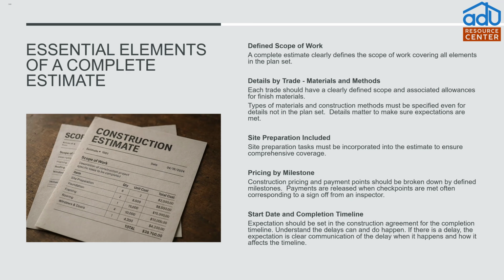When it comes time for, say, your electrician, the electrician should have it clearly defined maybe how many outlets are going to be there. They're going to talk about, if there's going to be extra outlets installed, what are their potential costs? Do you want to add smart home features to the ADU? These details need to be in place on the contract.